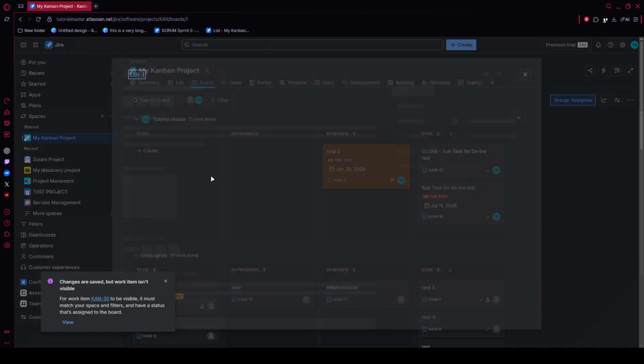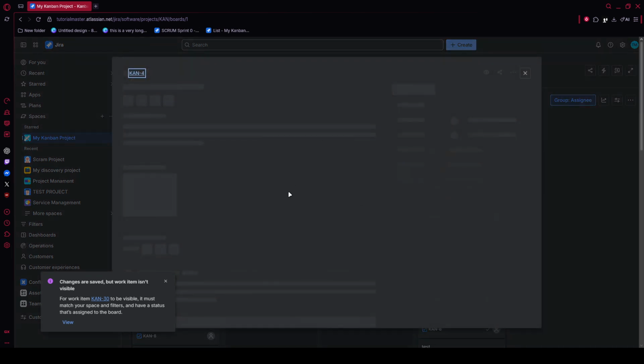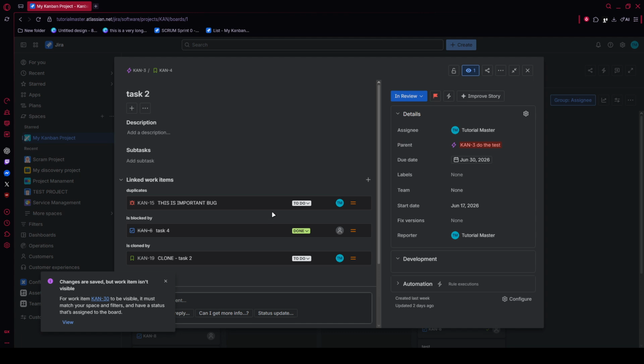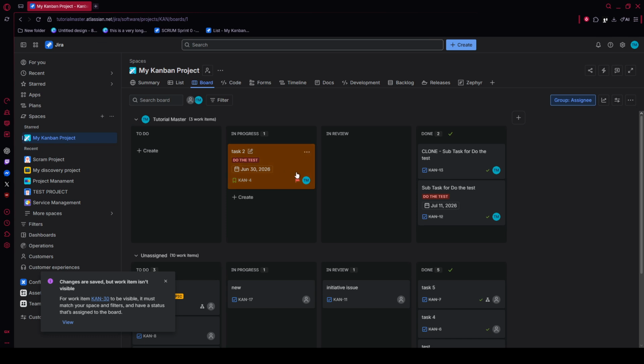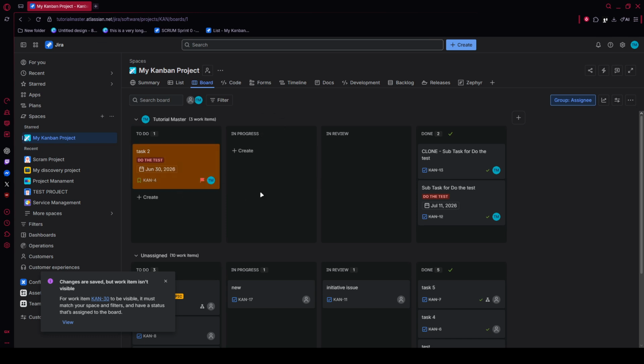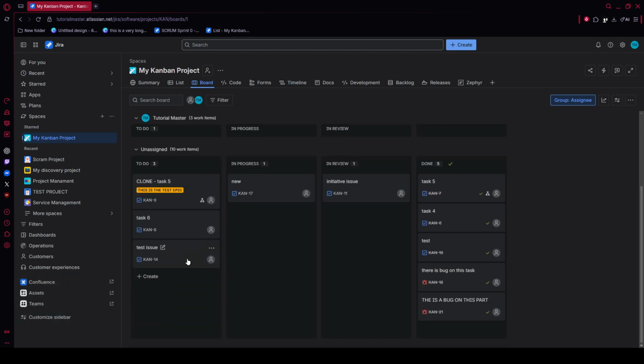As work begins, you can drag the card from To Do or Backlog into In Progress, then later into Testing or Done. Moving cards consistently keeps the whole team aligned on status. If you open a busy ticket with a long comment history, scroll to the Activity and Comment section and use the Summarize Comments option. This can quickly condense updates and help you catch up faster.